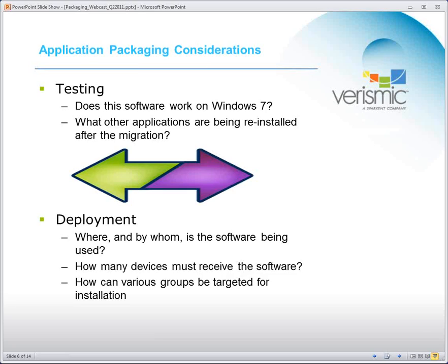Now keep in mind, we haven't even stepped into the deployment. Right? We're right now in the discovery and the preparation phase. That's where this comes in. And by the way, you're going to hear me say that another 5 times during this slide set. If it's the one thing I can stress, it's don't let the applications and any packaging requirements, be it so little or very large, wait until you've already started your migration. If somebody gives a kickoff and you're still asking these questions, that kickoff is premature.